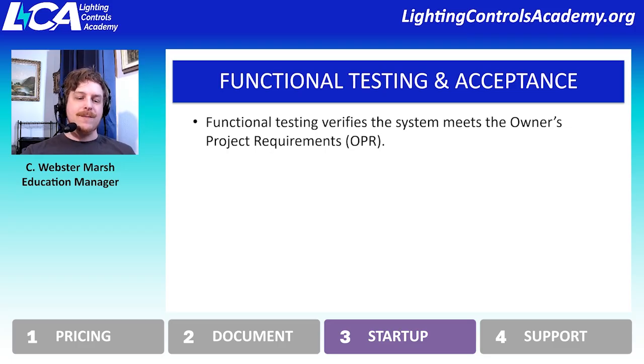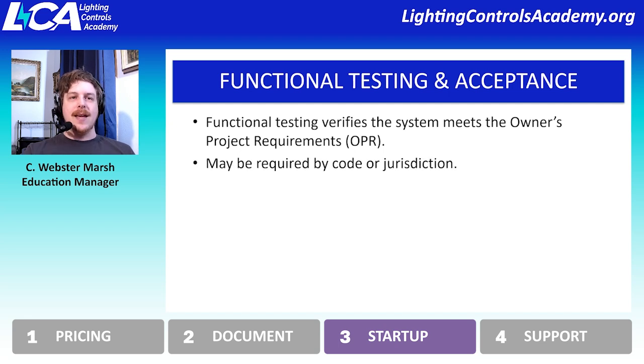But if the system's not programmed and not behaving the way that the specifications were stating that it should be, then that becomes a responsibility of the installation team or the manufacturer's technician. And additionally, codes or jurisdictions might have a specific definition for what functional testing is. And so making sure that the functional testing adheres to the code requirements or the jurisdiction's requirements can be a little fussy, but at the end of the day, functional testing is not just a term, it actually means something in specific jurisdictions.